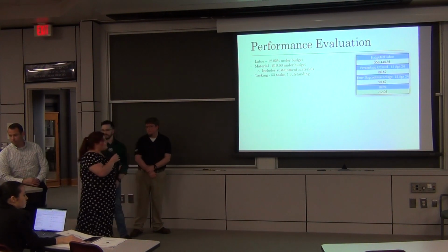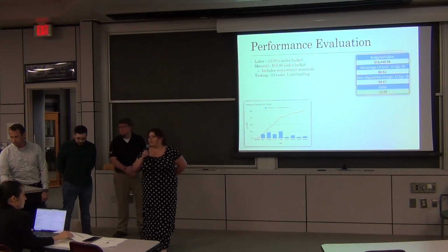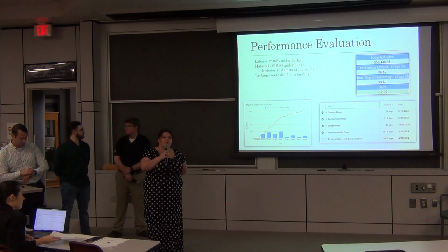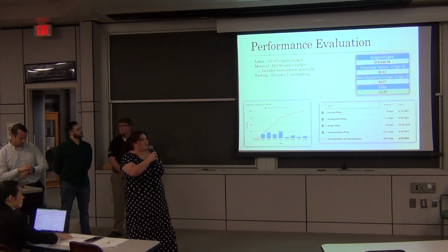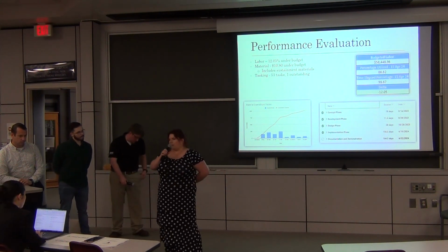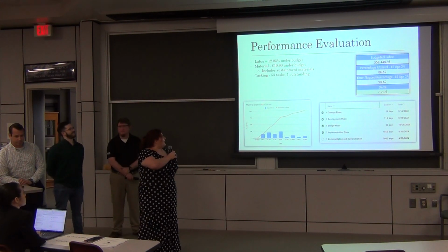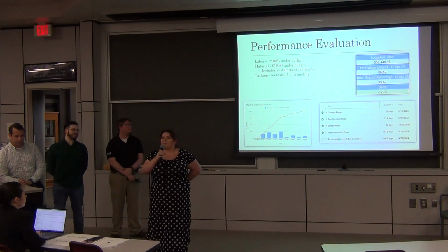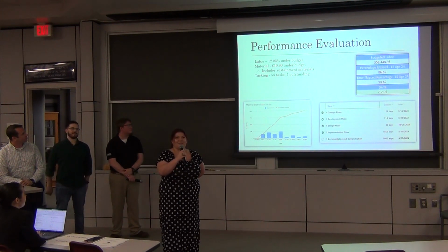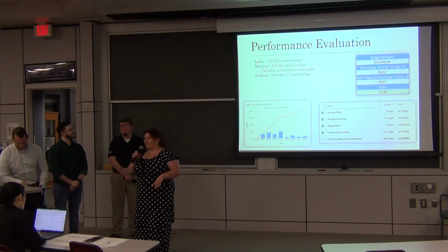So with the accomplishment of this project, we had a few different metrics that we wanted to evaluate performance. The first one, of course, being labor. We actually tracked everyone's hours using Microsoft Forms input and found that we were able to maintain 12.05% below our labor budget. That was probably due to winter break, if I'm being completely honest, because we worked a lot in the second half. As for material, we were able to spend $989.20 of our $1,000 budget. However, that does also include sustainment sparing material.